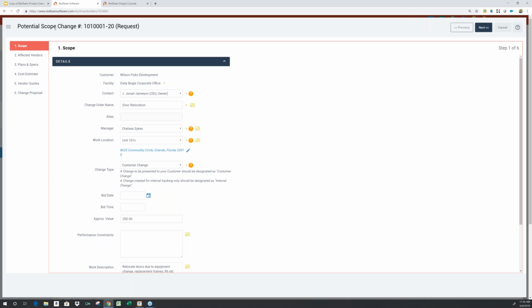So I've navigated into this change order editor, and I see I've got a 6-step process. Obviously, not all changes are the same. Some change orders can be very simple. It could be something that you've essentially agreed to on the job site. If you've got an agreement with your client, say it's a $1,000 change, you've done a handshake deal, it's very easy to skip steps 2 through 5 and go straight to step 6 and drop in a dollar amount, and in a minute or two, you can have a change order sent off electronically to your customer.